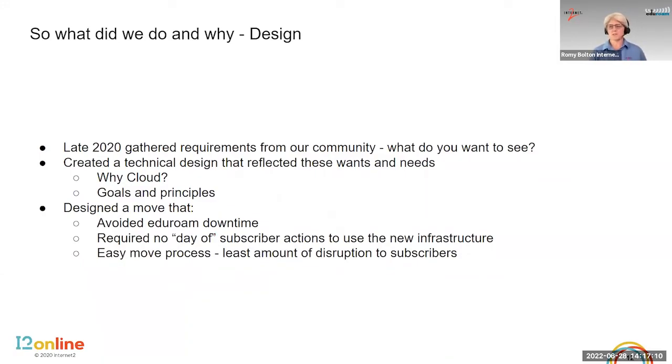We had a few things working for us and against us. One of those things was the fact that eduroam is super solid, right? It just runs. People come in every day, eduroam runs, and they're not logging into the console as frequently as you might be with some other applications. So we knew that we needed to establish communication with folks right off the bat. As I said, we also knew that this move wasn't as important to others as it is to us. So it was important to us that there were no day-of activities that had to happen on a campus, university, college, K-12 school, wherever it was, that this was able to happen without any action on their part. And that the move itself was pretty straightforward, with very little disruption. We didn't want it. So these were all of the principles that we used going forward. All right, next slide, Sarah, please.